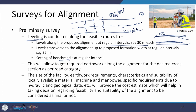Once all this information is in hand, it allows us to compute earthwork along the alignment and determine the desired cross sections required per the road category. Based on the size of the facility, earthwork requirements, characteristics, and suitability of locally available material, machinery, and manpower, everything is converted into cost estimates. A decision is then taken on which of the two or three alternatives studied in detail under the preliminary survey is going to be selected as the final alignment.